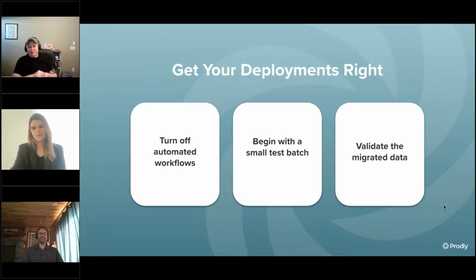Most of us, I think, have learned that the hard way, where we've just been so excited and we feel so good about the plan and everybody loves it and we're getting high fives. And then we click the button and you get an error and nothing happens, or you push the data and it's not done well or not done correctly and you miss something big, right? So do a small batch. Take 5 to 10% of your records, do the thing, see what happens, do an audit afterwards, make sure it goes well, and then you can go ahead and do the deployment.